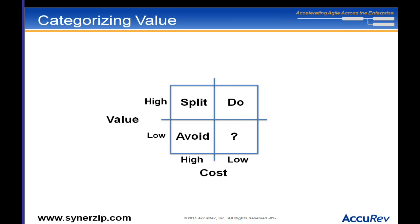If you can take something that's high value and high cost and turn it into a bunch of stories — some high value and low cost, others low value and high cost — you've made your problem simpler. Now all the pieces that are low value and high cost, you can avoid those. That's not always easy, but to the extent you can do it, this is a great framework to follow.